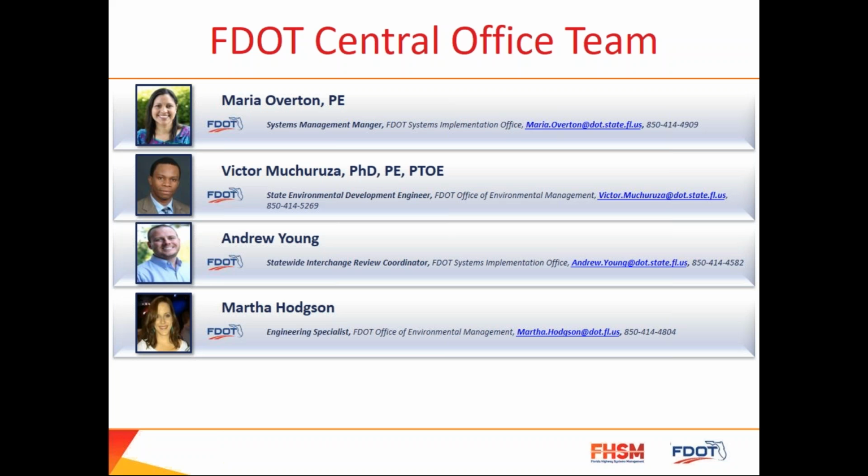If 3 years have passed on an IAR, do we have to reevaluate it if no significant changes have occurred with the traffic or the concept? Or would we have to develop a new one? No. If nothing has changed, then you just document no change in the report and you continue forward with the project. We have certain steps about validating the traffic to ensure that there has been no major changes. So just go through those steps and do the documentation.